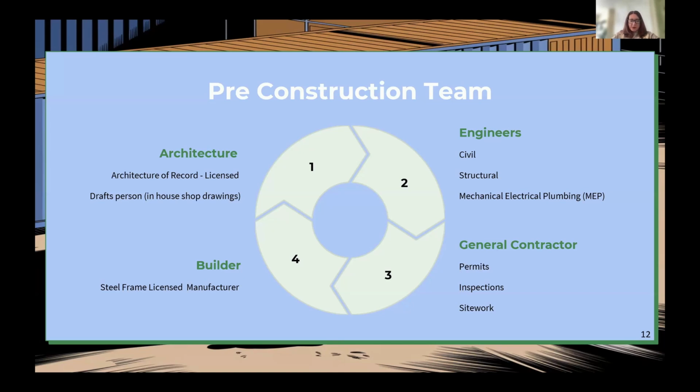That's important. So what I've realized professionally and in my talks with other colleagues is that we have a code standard across the US represented by the ICC. So since 2018, as I mentioned, the shipping container has been legally approved to be repurposed for residential and commercial use. Now, the irony of me saying that is that we all know, if we live in small towns or bigger cities, that not everybody is using the most current code standards. So there'll be times that even in a smaller community, they might have chosen to continue to use the 2006 codes where containers are not mentioned. And for whatever reason, they're not being encouraged to start to use the most current codes, for maybe historical reasons. I've heard that before, or just because they don't have anybody in their zoning and permitting to get them up to speed.